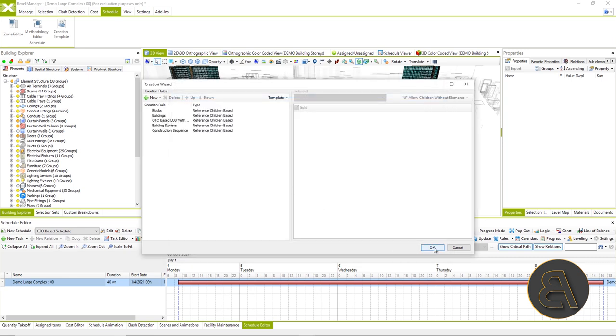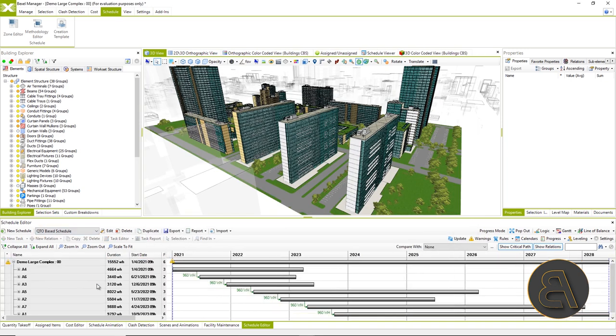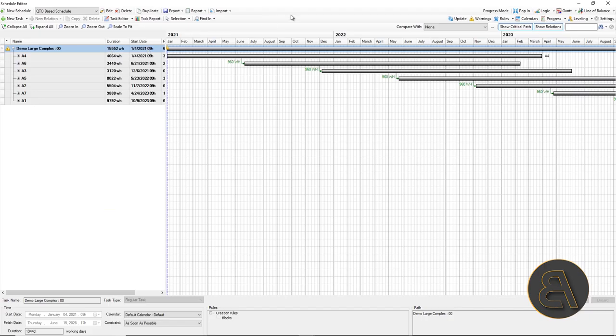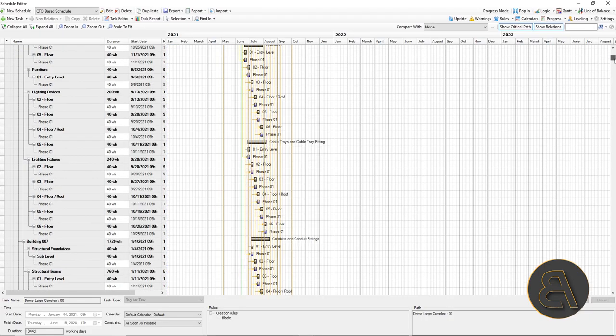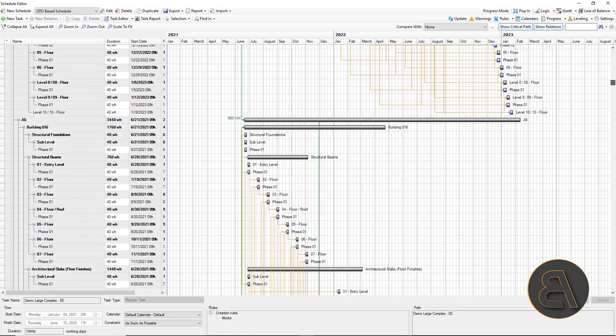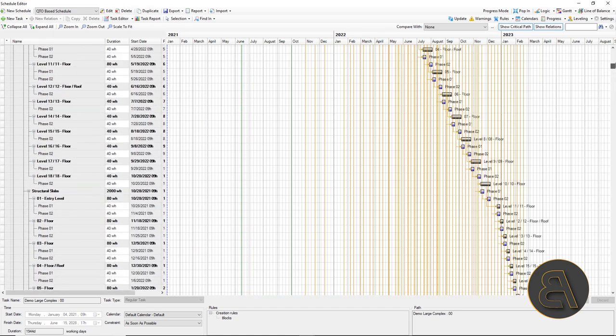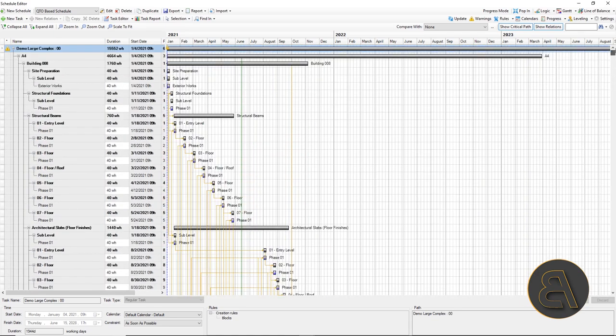When the schedule is created, by clicking on the creation wizard, we will import the previously created template and automatically get the finished dynamics with the created relations, task durations, etc.